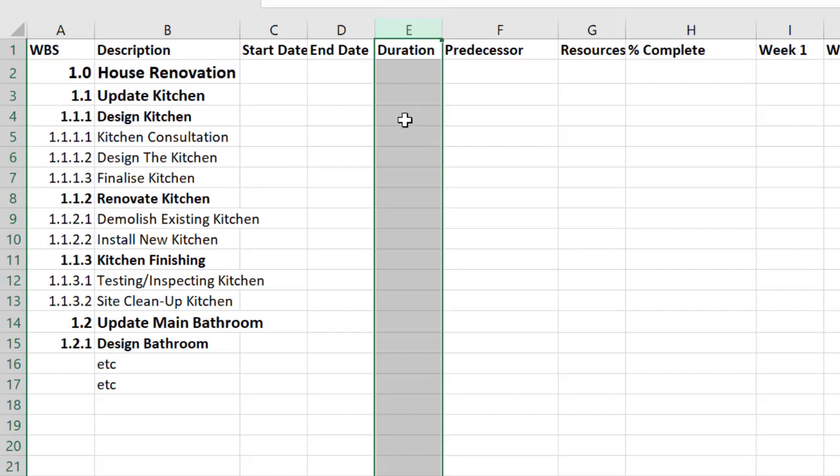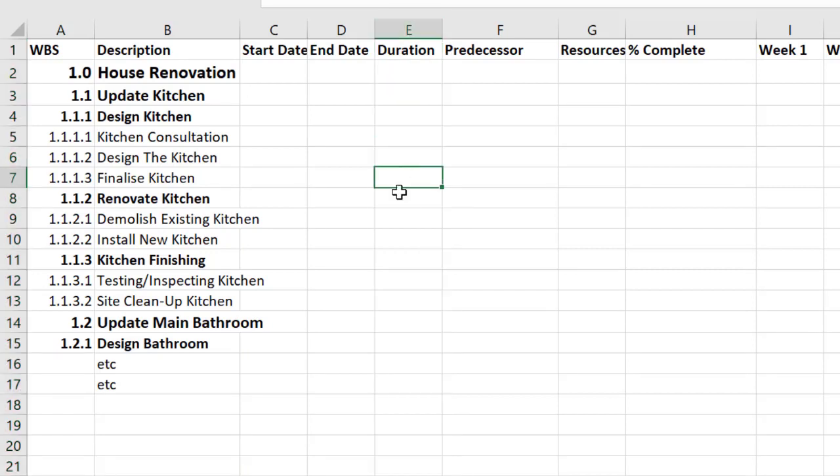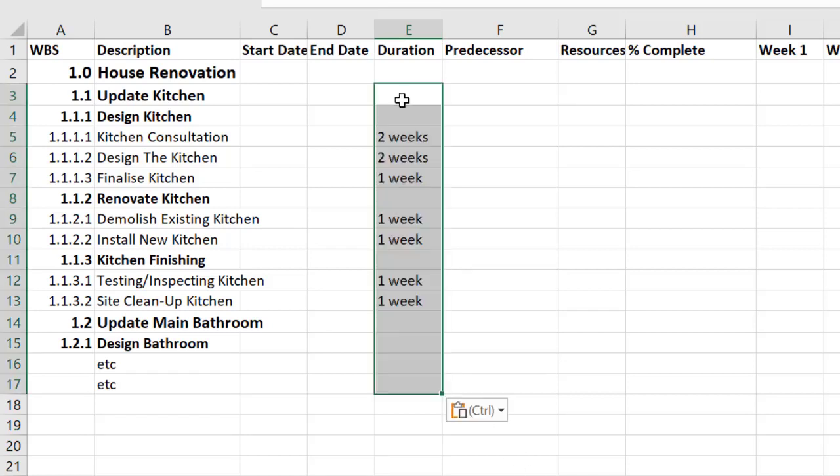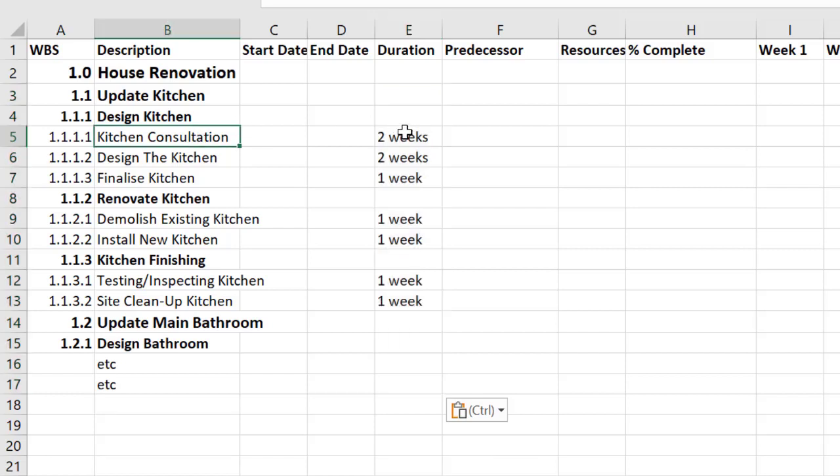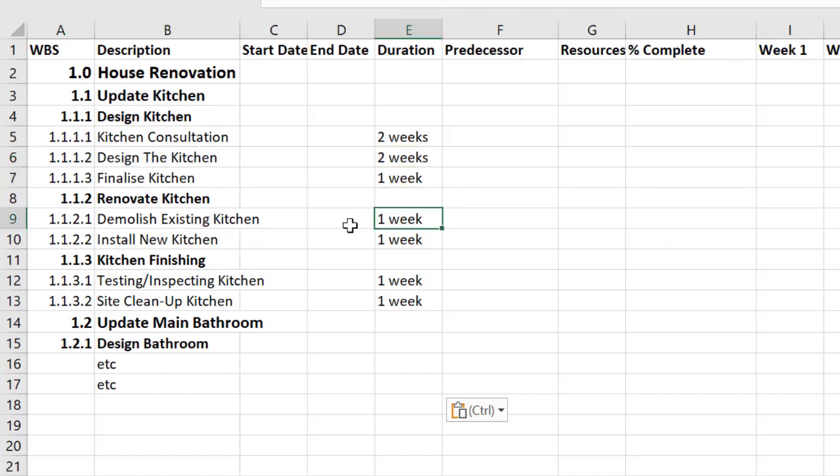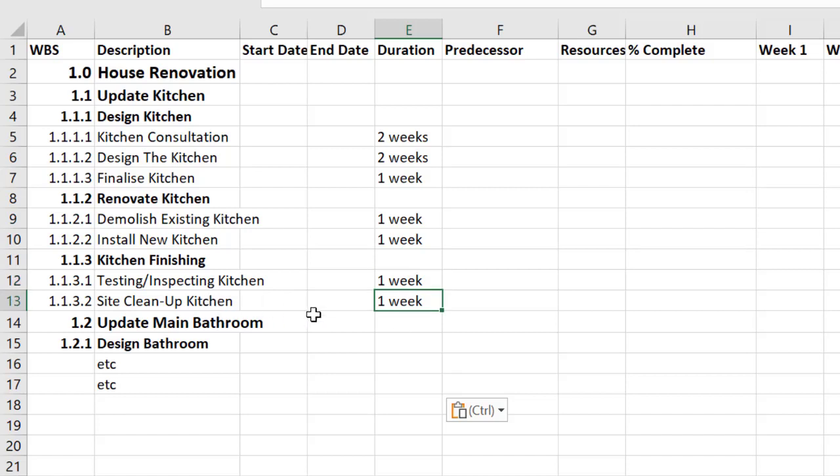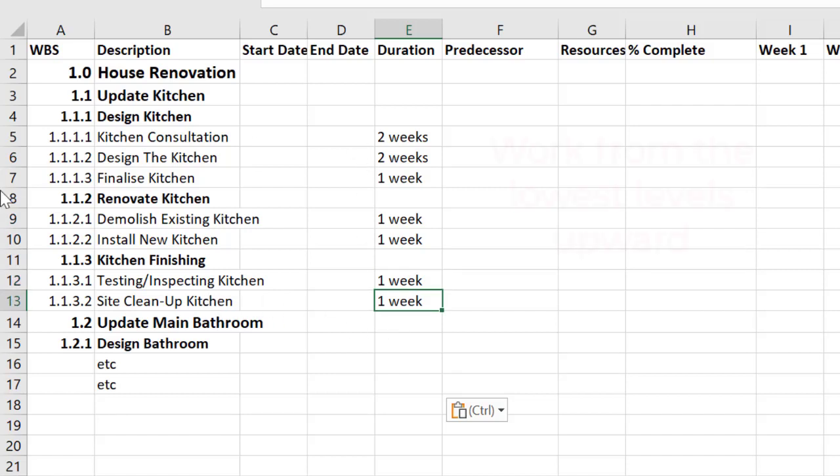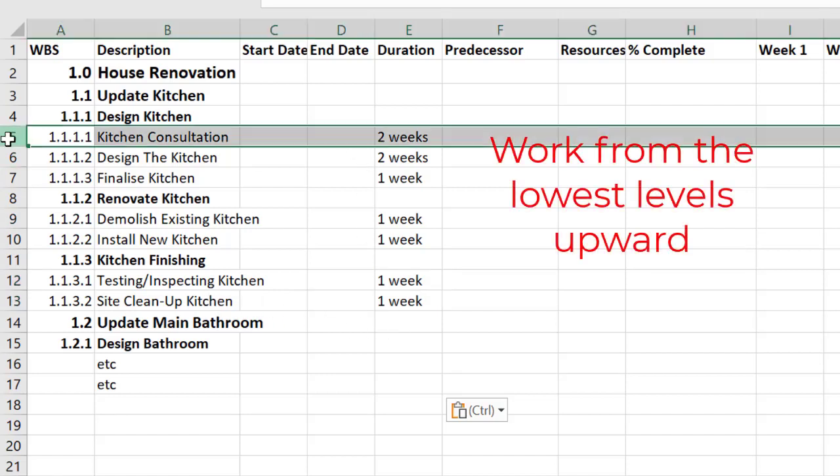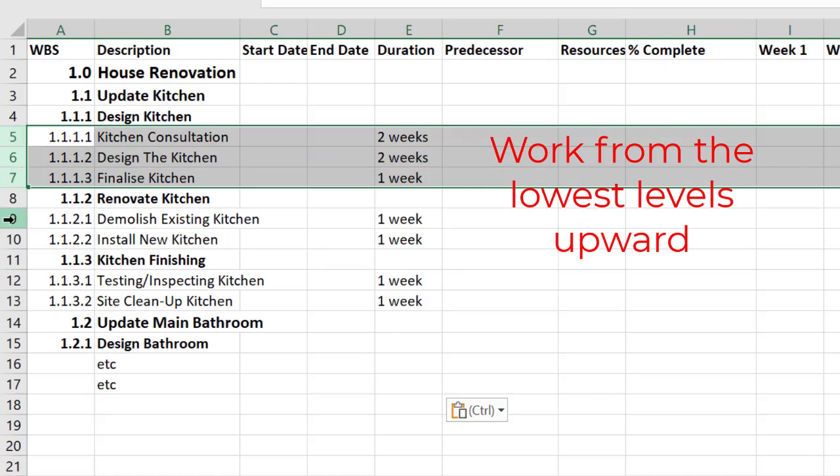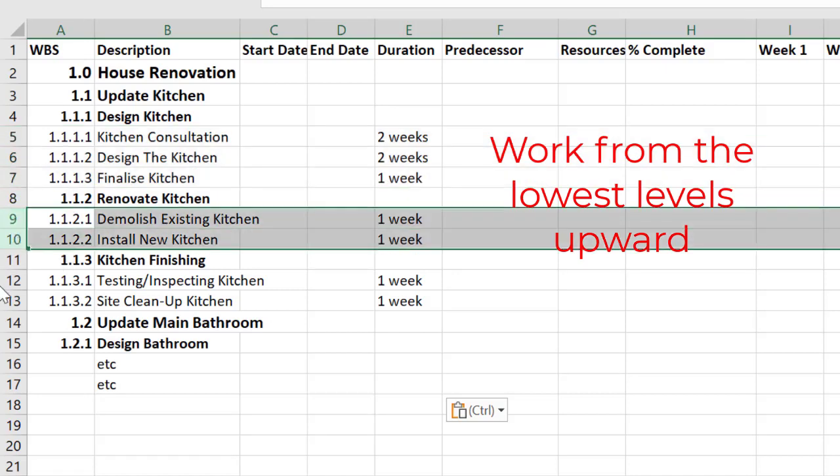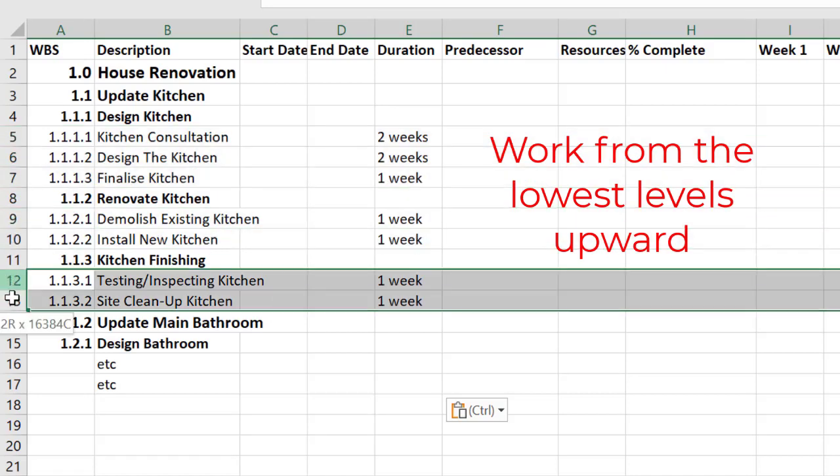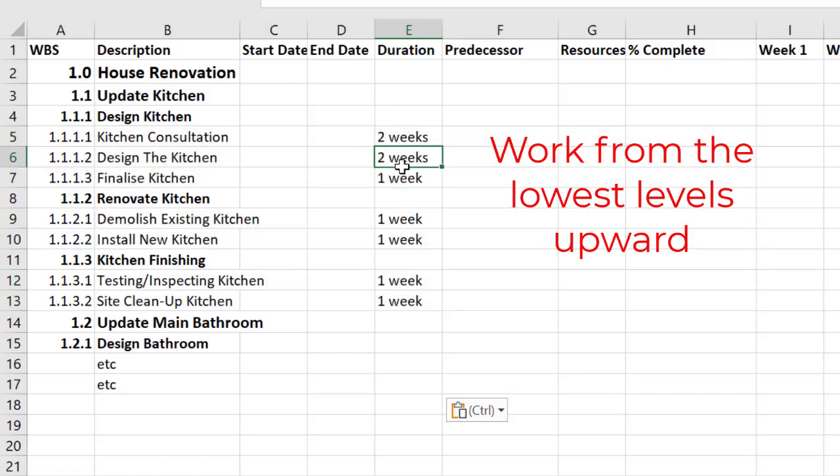So you may have durations given to you otherwise you'll need to estimate them. I've prepared some already for us and here are my durations. So I'm saying that I'll take two weeks to do consultation, two weeks to do the design, one week to finalize, I'll need a week to demolish, a week to install, I've assumed it's a small kitchen, then a week to do all the testing and inspecting, and then finally a week to clean everything up. What you'll notice here is I'm working only from the bottom level, not from those top deliverable or work package levels at this point.